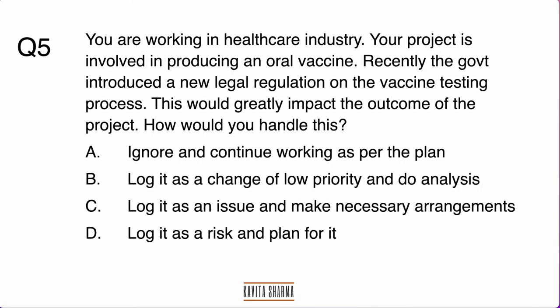Last question: you're working in the healthcare industry producing an oral vaccine. The government introduced a new legal regulation on the vaccine testing process. Would you ignore it, log it as a change, log it as an issue, or log it as a risk? A regulation must always be complied with, so this is something you must deal with now. Risk is a future event with a probability; this has already happened and is a present concern. So it's an issue — answer C is correct.